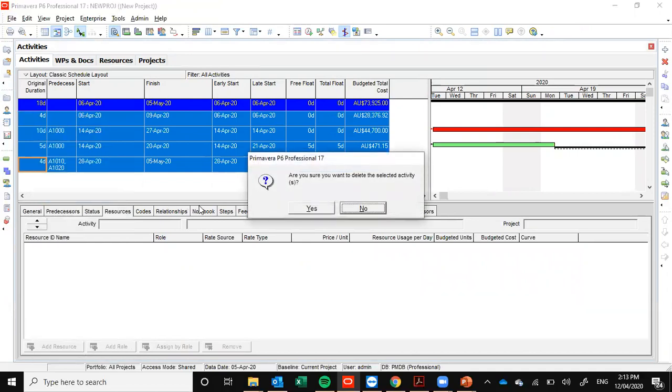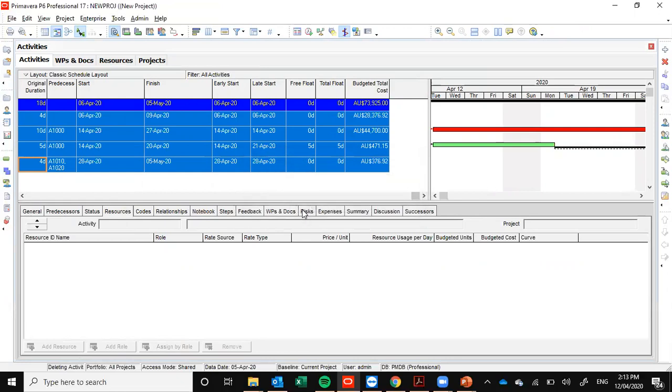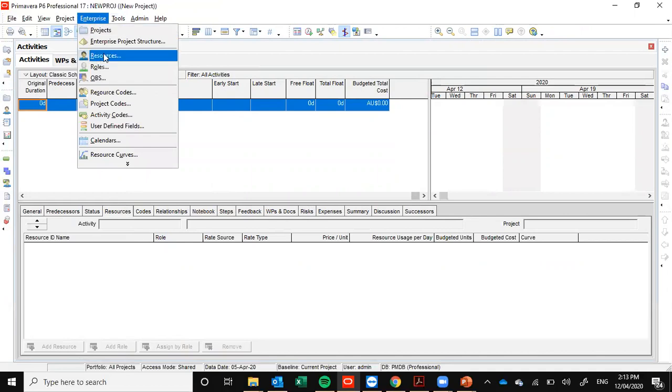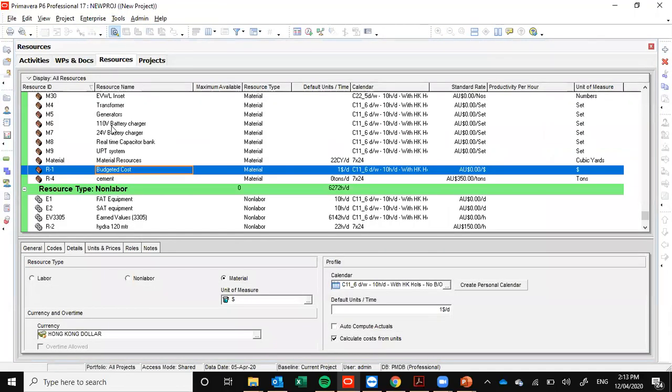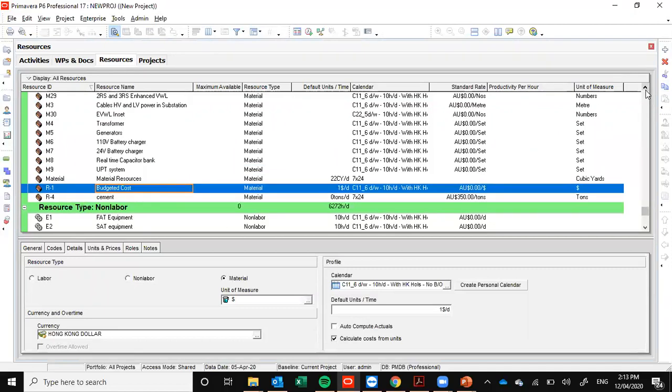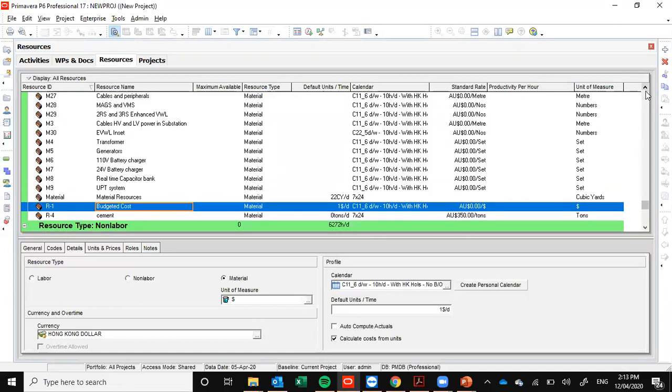So you will get a proper idea. I'm not going to take many resources, just a single resource to show you how it looks. In our resources, mostly only with the labor resources we are doing leveling, because material we pick up as per our execution needs, and even equipment is available 24/7, so we don't have a problem with materials and equipment.